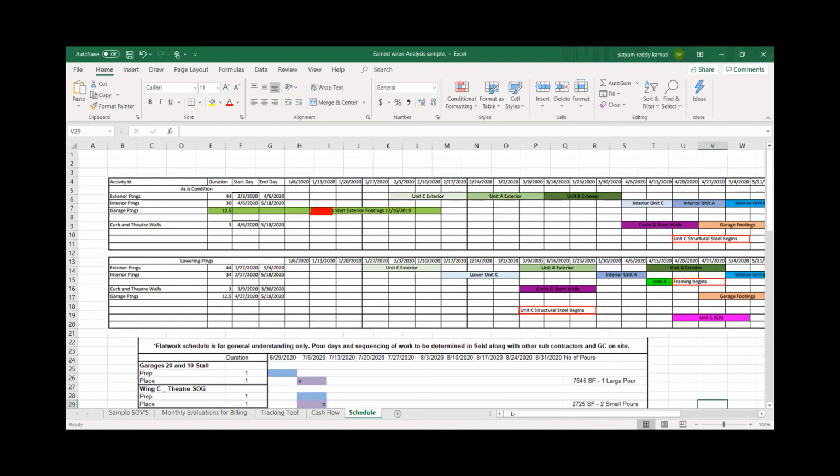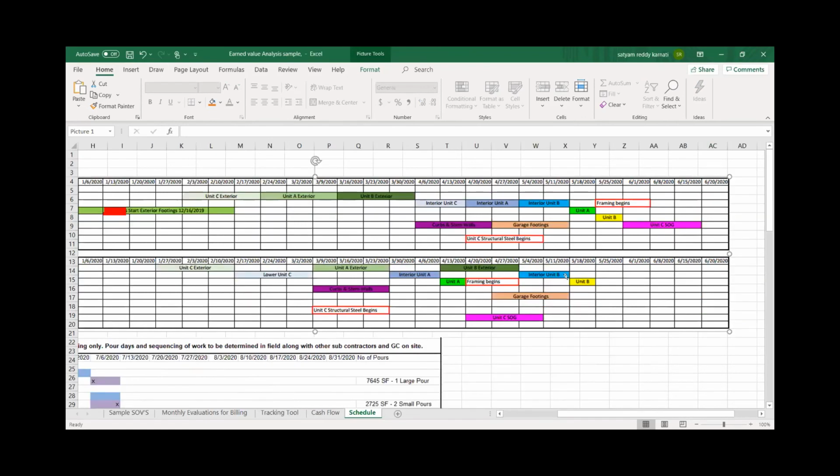As far as the schedule, for this sample project I have, this is my initial schedule according to the general contractor. They have this specific start date, 1/13, and I have my revised schedule. I say, if I still start on 1/27, I should still be able to finish it according to your timeline based on my schedule, because I am overlapping and having multiple crews. So when I produce my schedule for them, they will understand, and that goes into the document.